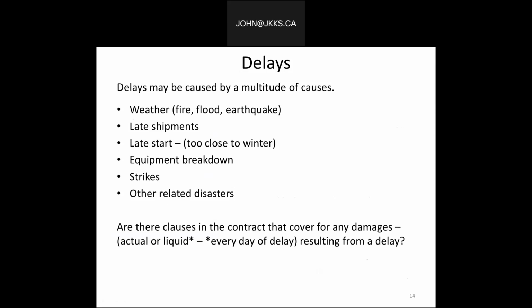So there are several common reasons, as I indicated, for causes of delay. If the delay is under the control of the contractor, then it's on the contractor. Otherwise, additional time, cost, or consideration may be warranted in any construction contract.